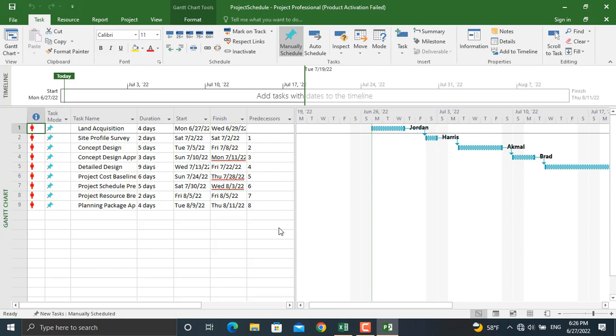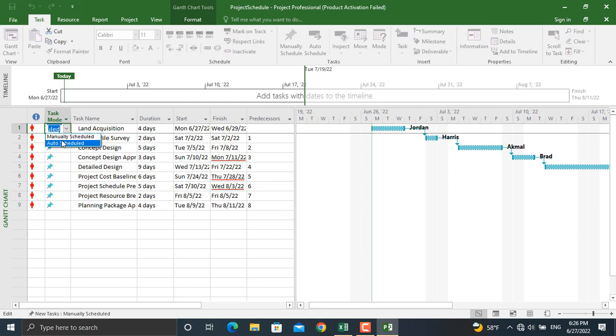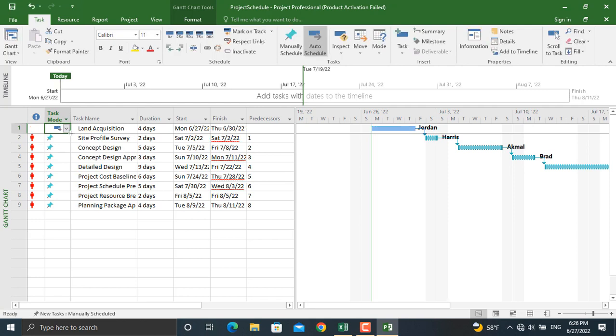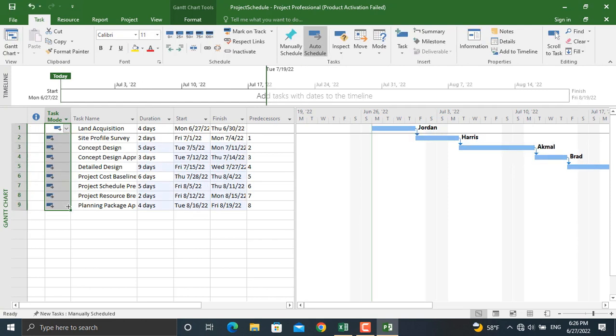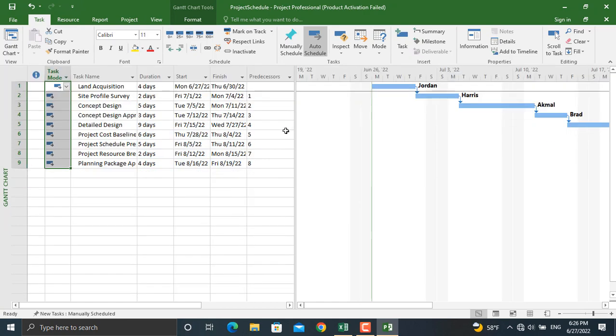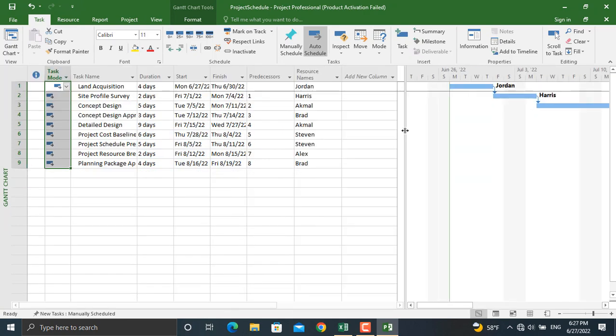In order for the schedule to be fully customized in Microsoft Project we have to do some adjustments. For example, for the task mode I will change it to 'Automatically Schedule' and I will apply this to all of our activities in the project. And as you can see, everything, the resource over-allocation and everything is resolved. As you can see in the schedule we have the resource names.